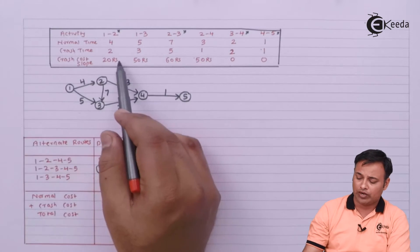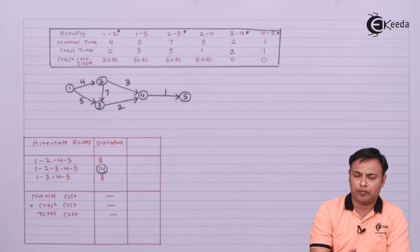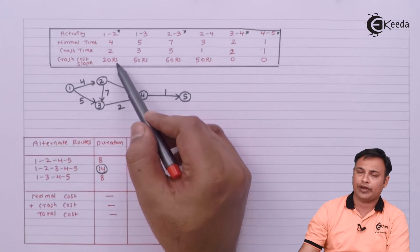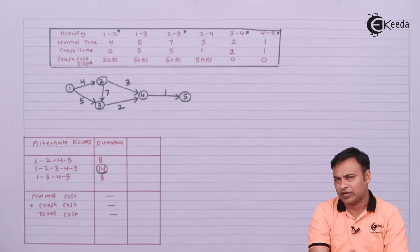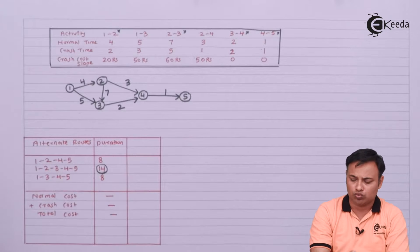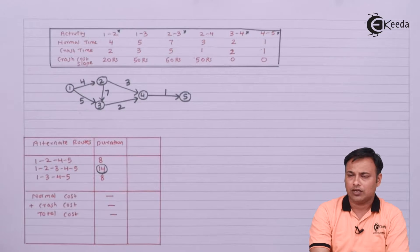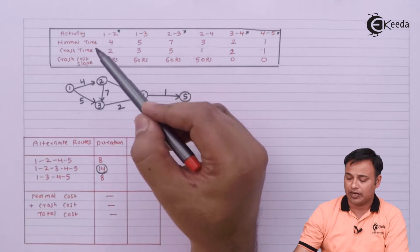So it is between 1-2 and 2-3. The cheaper one is 1-2 with 20 rupees per unit of time. So I will crash 1-2. The second thing is by how many duration I can crash 1-2. As per this table...